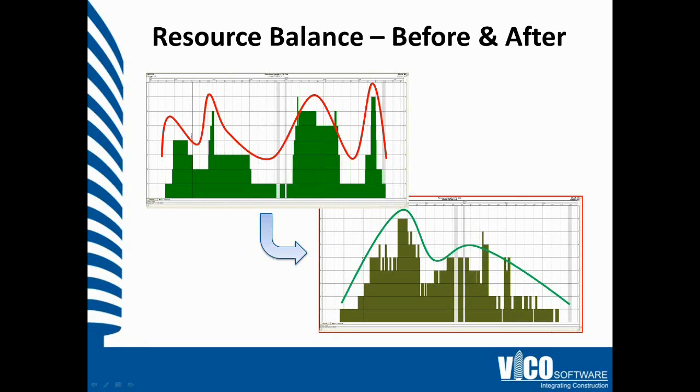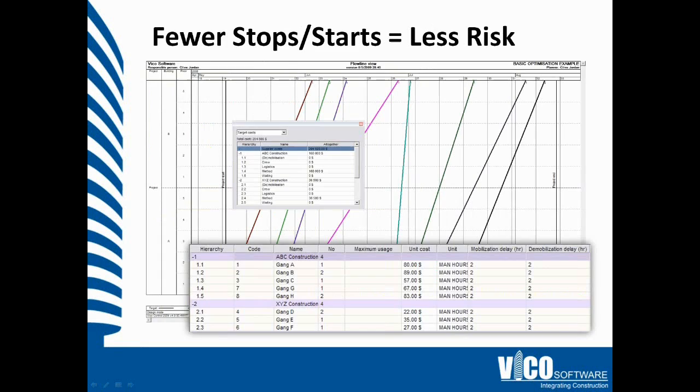You can quickly see that area A is suggesting for the next 3 weeks you're going to have 30 guys active. You may not be able to support that number of men in your location. And so using the resource graph as a tool and your filtering properties as a tool to analyze the original plan and use that to optimize is one of the goals of this exercise and this service.